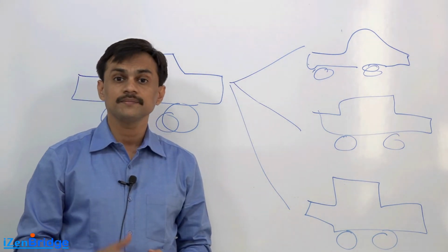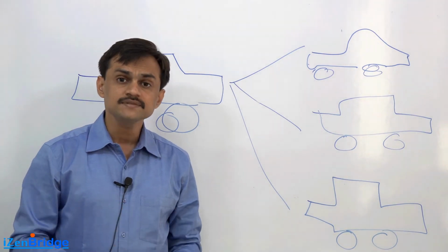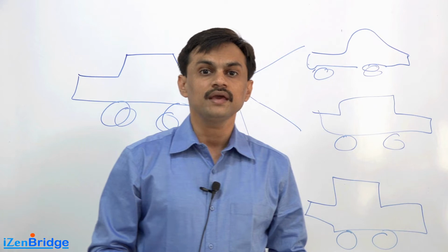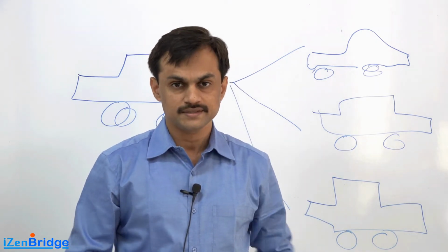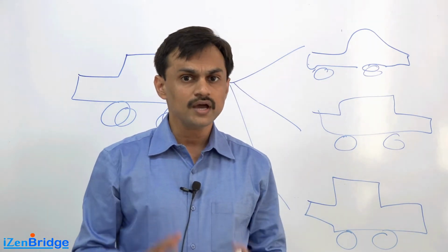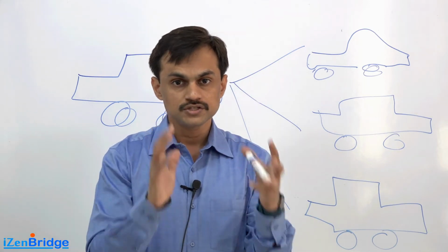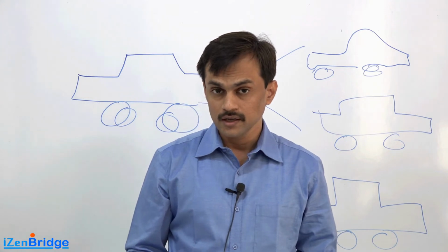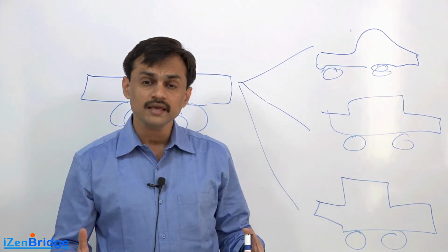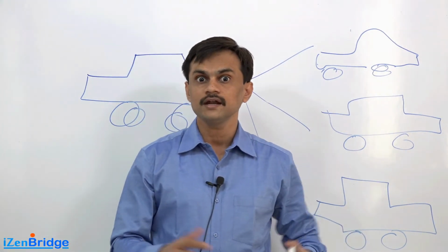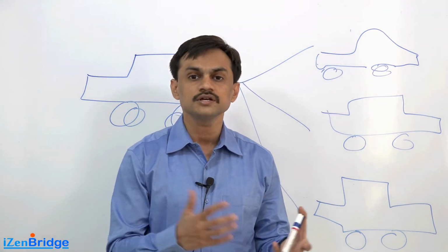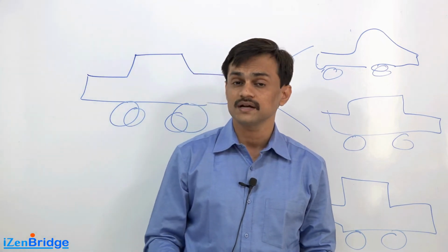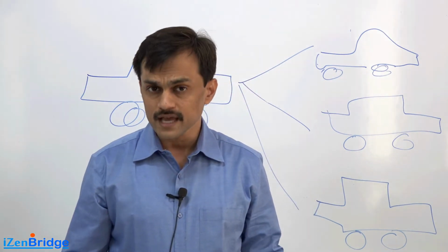As a project manager, many times you struggle because your team gets confused between quality and grade. If you are expected to make a mobile phone for students, the target segment is students, and you have a set of expectations from your stakeholders, and this mobile phone has to be sold for $100, and your team starts making a mobile phone which may end up costing you $1,000, it doesn't make sense. Both of them are mobile phones, but they take care of different customer segments.